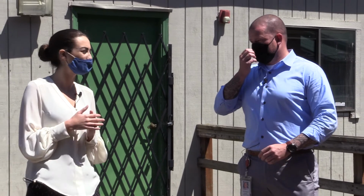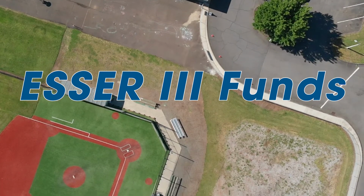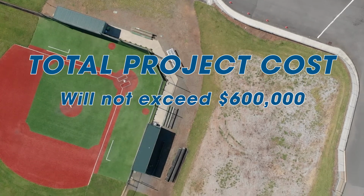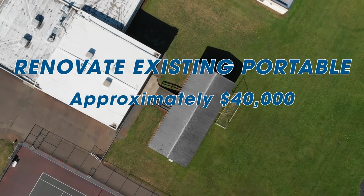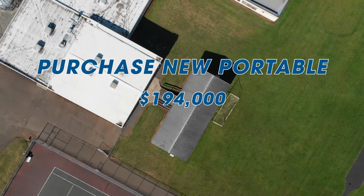Okay, so talk to me a little bit about cost. What will the full cost of this project look like, and where will those funds come from? Right, we're utilizing ESTR funds to be able to support these projects. Ultimately, we're not going to exceed $600,000, but for the portable here, we're estimating about $40,000 to renovate, to move, and get utilities hooked up. Like I mentioned earlier, the brand new portable is $194,000.